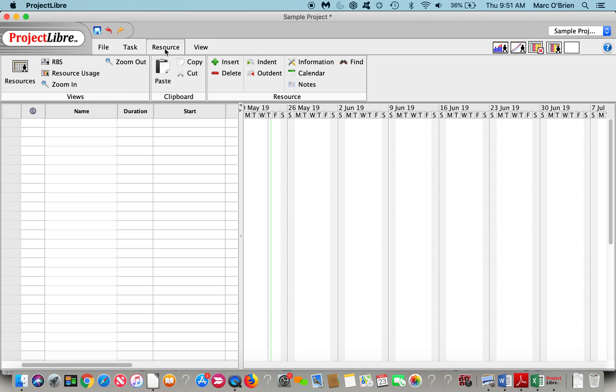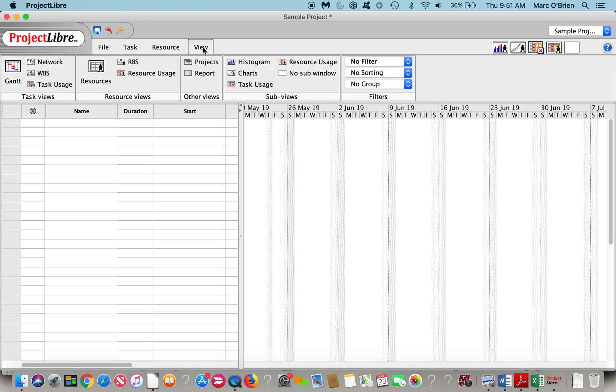With the resources, you can set up a resource pool, and you can also have a hierarchy. So you can have a resource breakdown structure. And that rolls up availability as well as costs as you go through there.